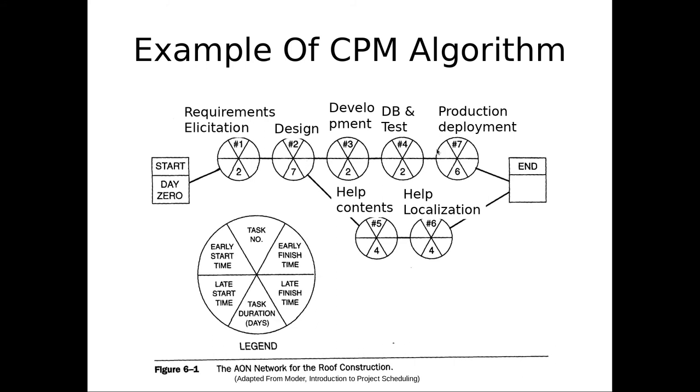Because the latest that successor could start, it's the latest it could start without delaying the whole darn project. So if we finish this after that late start, we're delaying the project. Do you got that? It's still on the critical path. And then you work back from there, and I would argue this is 9, so this will be 2, and this will be 2, and that will be 0, and this is on the critical path, just like was suggested. Do you see that? So that's the forward and backward paths.